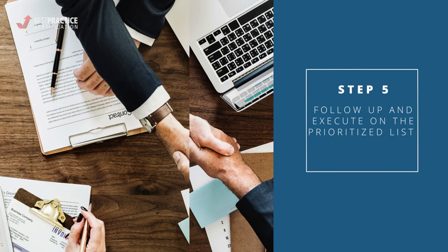Now, the last part of prioritizing that list is it's important to identify follow-up. So part of this step is about follow-up. We've written the list, we go to the organization, we say, this has got to be improved, then following up, how's that going? Has it been improved? Has it been finished? Or execute. And the most important part there is execute. Lots of people out there writing lists and doing risk registers and all that sort of stuff, but following up to ensure those actions that have been identified are closed out, that they're implemented, that it's been executed is a critical part here.